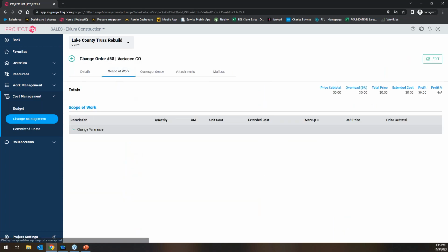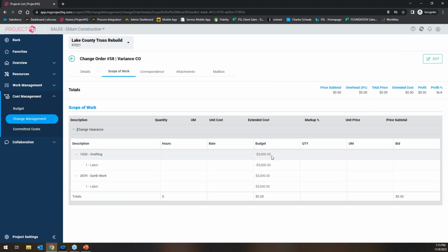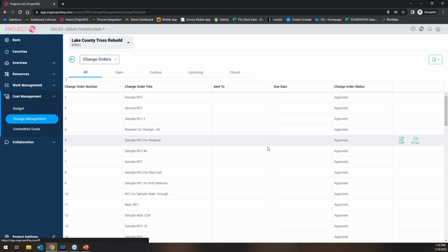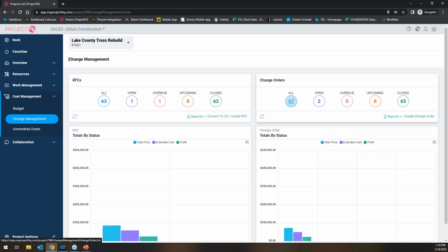So you might have to pull funds from one line item to another. Maybe you've got a variance or contingency code that you can adjust these dollar amounts from, or maybe you have a profit line. That's how you do it. But yeah, basically anytime you need to adjust the budget, that's where you get into a change order here with Foundation. But those can also push back into Foundation.